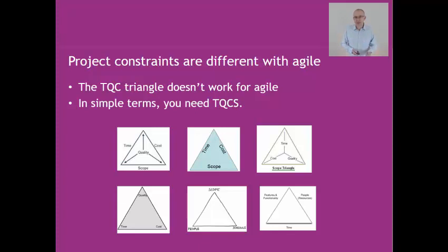Now, a lot of you have been using project management for a long time and you've probably been playing with scope anyway. What I'm trying to say is that this is the center of attention and this is the way Agile works. Time is fixed because we're time boxing. Resources are fixed. We're trying to move quickly over, say, 2 to 4 weeks. Quality is fixed because you shouldn't be playing with quality. There's one place left to go.